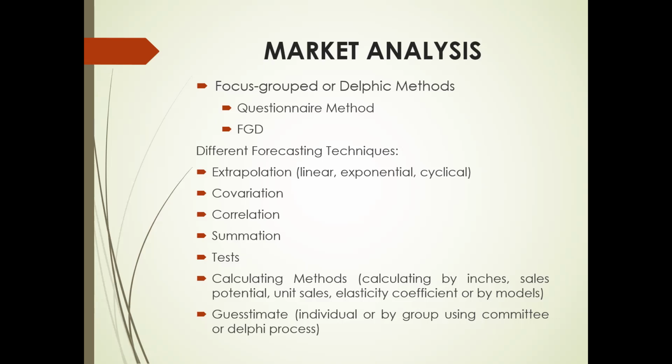With regard to the individual tourism project and the evaluation of its economic feasibility, the forecasting of the potential market demand usually covers the medium term to long term forecasts, which is the first 15 years of operation. This is appropriate because most commercial tourism projects operate to reach their full financial and operating potential within the first 5 years of operation and pay back their investors' equity within 10 years.